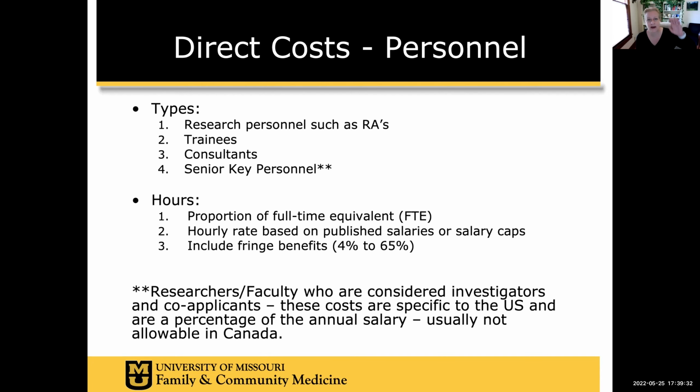Hours. So when you say, okay, I'm going to need an RA with this skill set, and you use your skill set to justify the amount you're paying them, you then have to say, do I need them full time? Do I need them 1 day a week? Like, do I only need them for 2 weeks? So you have to then calculate either the total number of hours you need them, or how many parts of the week you need them, which is a full-time equivalent.